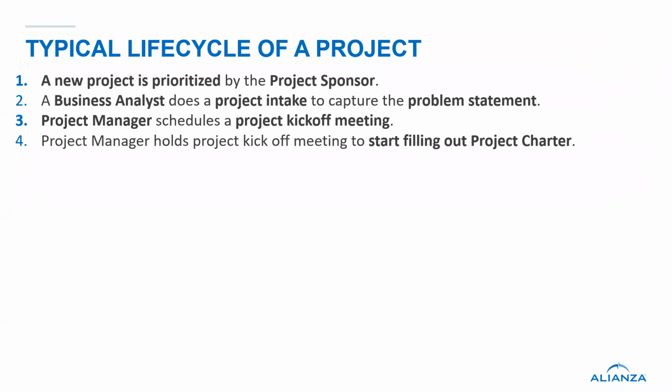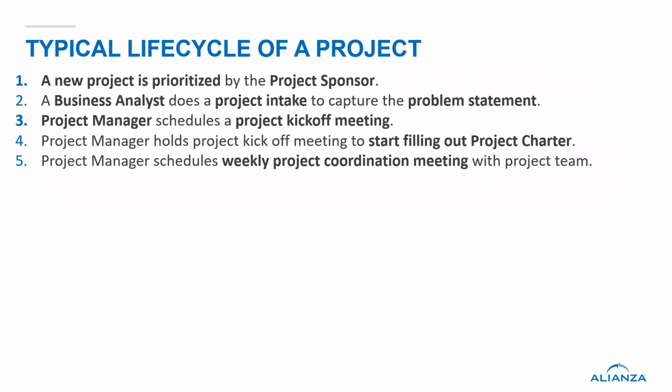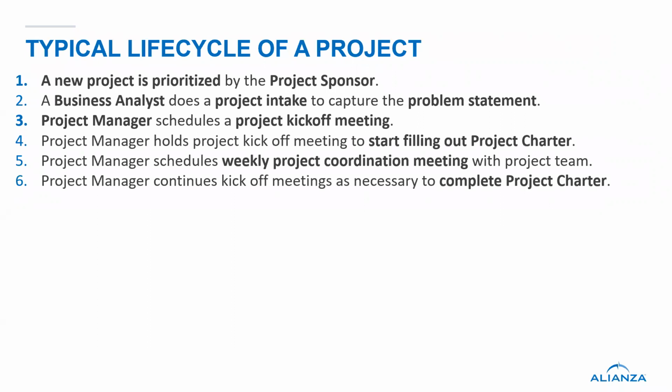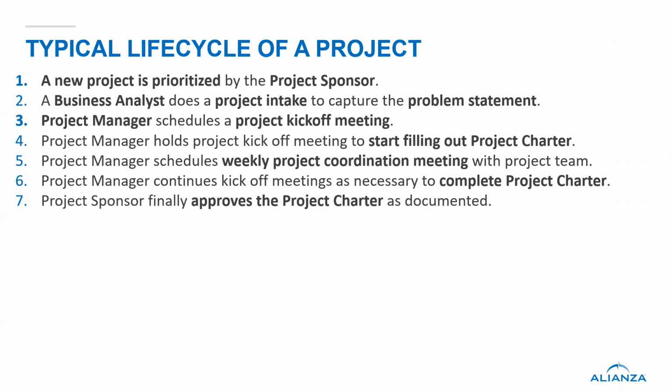Project manager holds the project kickoff meeting to start filling out a project charter, like get me the details. Project manager schedules a weekly project coordination meeting with the team to be able to continue working through the project. Project manager continues kickoff meetings as necessary until you complete the project charter. Normally it's about 2 kickoff meetings, 2 coordination meetings to get a project charter done. Or 1 2-hour session. I've done that too.